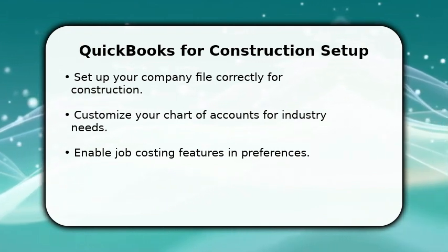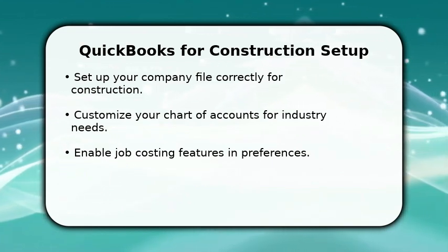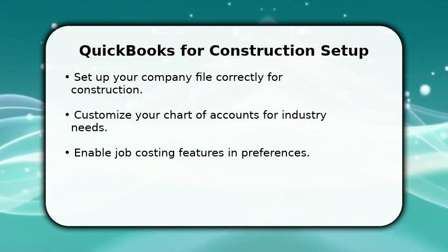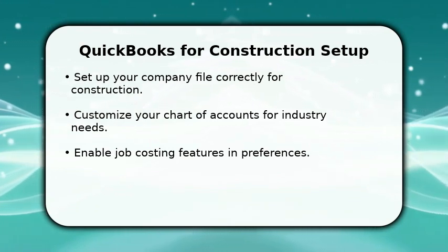Ensure job costing features are enabled in your preferences, which is crucial for tracking project expenses. Finally, create customer jobs for each project you undertake, linking all related transactions.